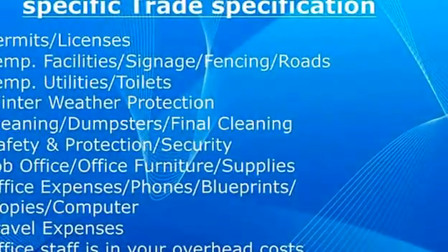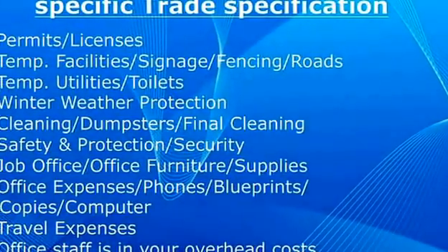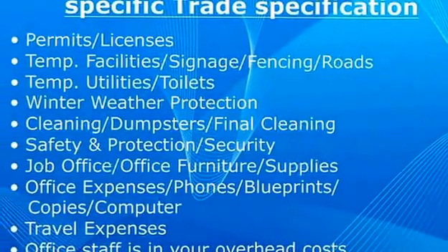Travel expenses. Is my project manager or my superintendent driving between multiple jobs? Is he on one job only? Then I don't have travel expenses. So it could be minor dollars, or it could be a decent expense. Some companies might include job vehicles in that. If their superintendent has a company truck, they have to pay for that truck somehow. Do they put it in here, or do they put it in his hourly cost for their supervision?